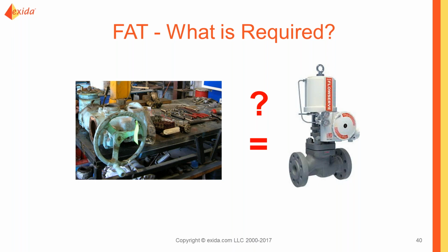Whereas if you're getting a specialized assembly from an integrator, you might want to witness that and do some confirmation steps before that integrated assembly ships. And the same could be true for dual acting valves where you've got a hydraulic skid that goes as well. There can be pumping systems or motor systems that come with their own electrical panel.